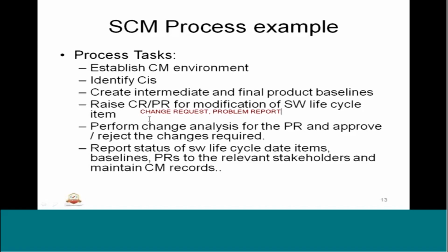Perform change analysis for the PR and approve or reject the changes required. This is also an important process. Report status of software lifecycle items, baselines, PRs to the relevant stakeholders and maintain the configuration management records. This is also one of the process tasks.